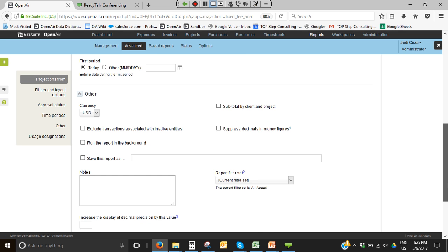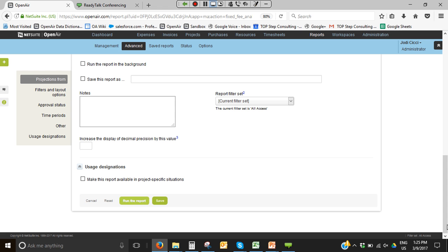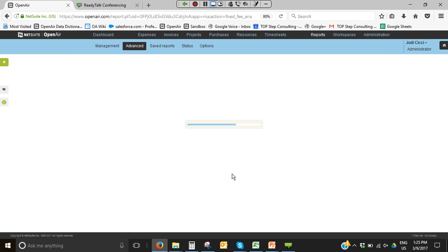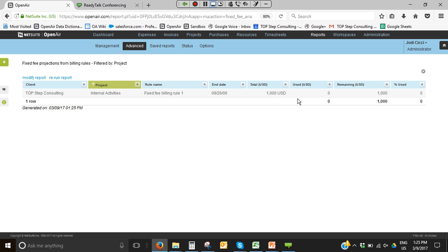then what it allows you to do is when you run it, it comes up and it says, oh, here's the project, and here's how much we should have invoiced. And that value that shows up in whatever period, the first period, that would be something that is either in the current period or it's in the past. And those are the ones that you have to go look at to find out, why didn't we bill this? Did we forget to close a milestone? Are we late on delivery? So it gives finance that ability to go back to the project managers and understand what may have been missed.